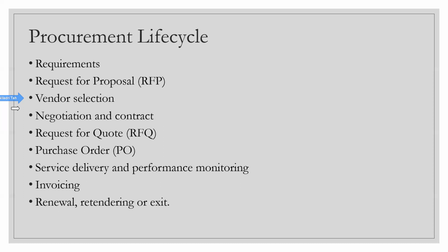And then you select the vendor based on all the three vendors. When they come to your company for interview, you do it like 1:1:1. Like you do the tech rounds with them. And we generally call them tech rounds because the next part will be the negotiation and the contract, which generally the project manager does not do. But let's say you have done the tech rounds with three of the vendors, and you then do a brief, or a debrief, of all the tech rounds.